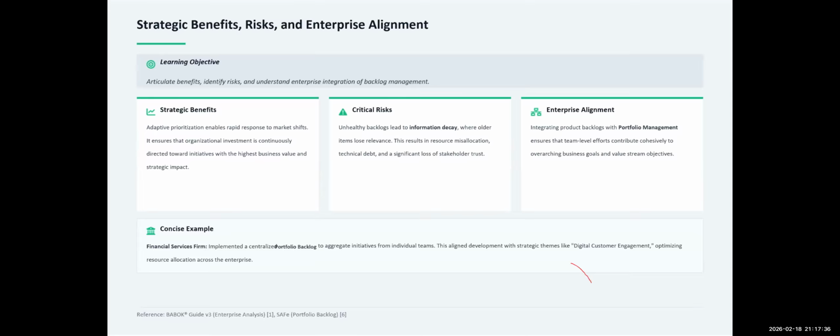For how long should an item stay in the backlog? And also, what are the things, in terms of information, that are required before an item is logged into a backlog? If that information is not provided or available, you're going to enter into an endless loop of items in the backlog.